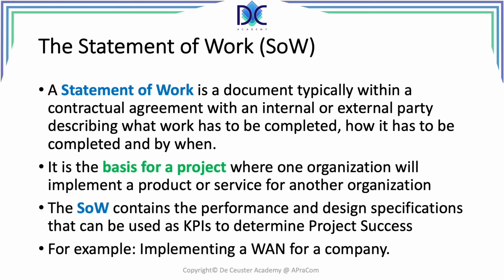The statement of work is the basis for the project. One organization will implement a product or service for another organization. The statement of work contains performance and design specifications that can be used as key performance indicators to determine project success. This completes another session.